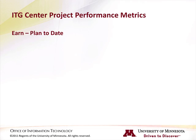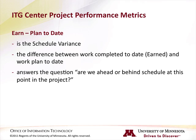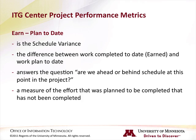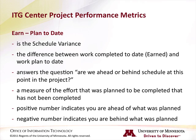Earn minus plan to date represents the schedule variance. It's the difference between work completed to date (earned) and work planned to date. It answers the question: are we ahead or behind schedule at this point in the project? It is a measure of the effort that was planned to be completed that has not been completed, and it quantifies the number of days the project is ahead or behind in work effort to complete its deliverables. A positive number indicates you are ahead of what was planned; a negative number indicates you are behind.